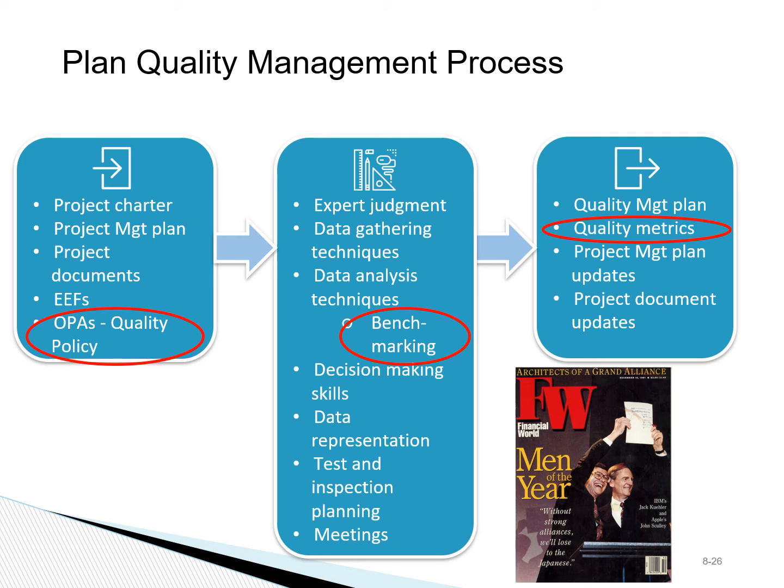One of the effective tools for quality planning is benchmarking, where we compare the performance of various organizations in a particular area. When I was at Chevron, I led 2 benchmarking studies of our capital project management process, and we found out that our projects are costing the company more than the industry average.